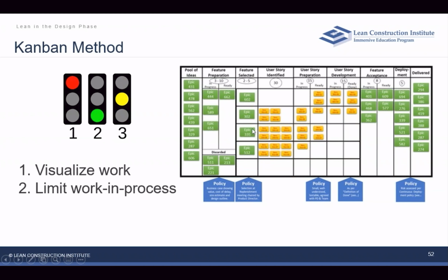And what this does is it allows us to get more focused on finishing tasks than starting them. There's a saying in the Kanban community: stop starting, start finishing. And this is a way of focusing, again, right to left, and actually pulling our work through the system and focusing more on finishing and getting work done.